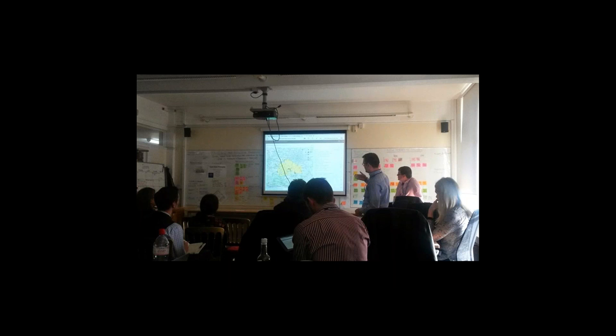This illustrates our working environment. On the walls of the room you'll see the design artifacts and our product backlog. Anyone involved in these sessions can view the stories in the backlog — what work is in progress and what we've done. We encourage anyone who comes along to take a post-it note, write down features they think the solution needs, and stick it up on the whiteboard. All that we will actually consider going forward into future sprint planning.